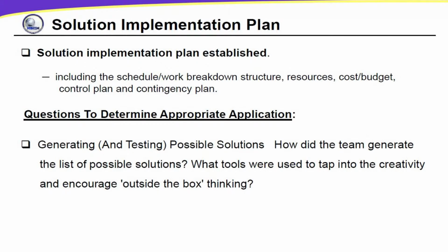And in this case, we can talk about the replication plan. The pilot replication plan here means that you have done a pilot successfully. How do you replicate the changes throughout the organization? We do have an implementation and handover plan. Now, as a green belt or black belter, you may not be the process owner. So therefore, you need to have what we call an implementation plan. What are the things that you need to hand over to the process owner so that the changes that you have advised or has studied in the project will be implemented throughout the organization. So this is an important stage.